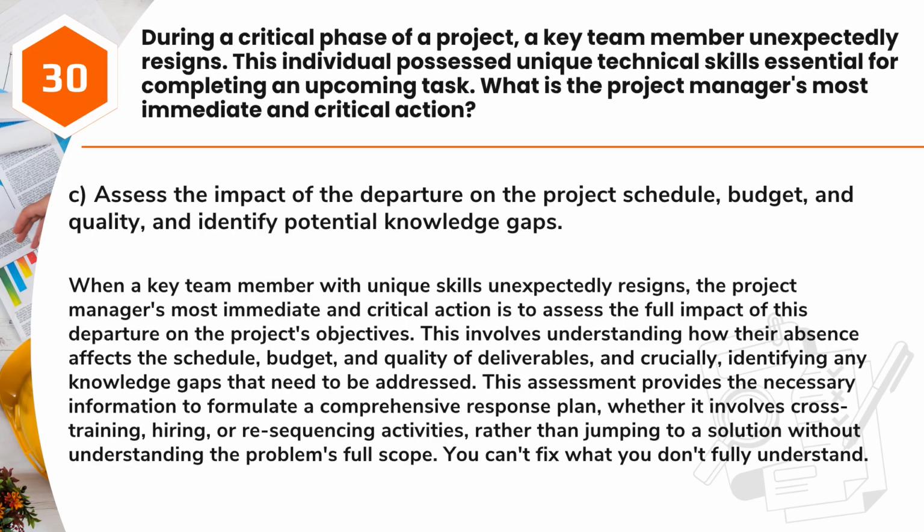Answer: C. Assess the impact of the departure on the project schedule, budget, and quality, and identify potential knowledge gaps. When a key team member with unique skills unexpectedly resigns, the project manager's most immediate and critical action is to assess the full impact of this departure on the project's objectives. This involves understanding how their absence affects the schedule, budget, and quality of deliverables, and crucially, identifying any knowledge gaps that need to be addressed.